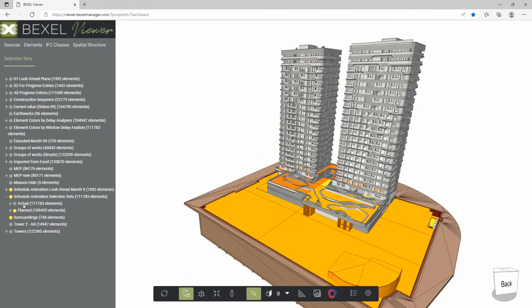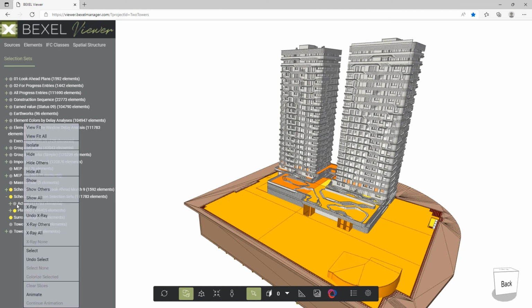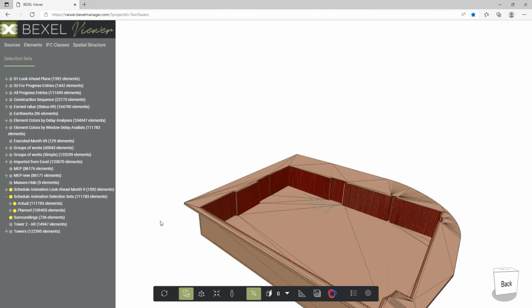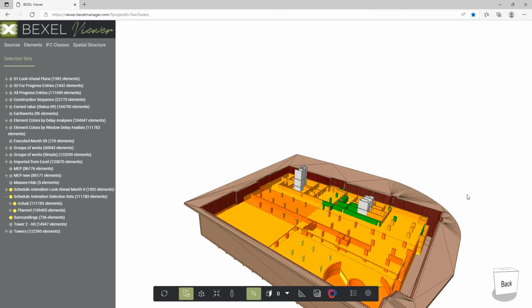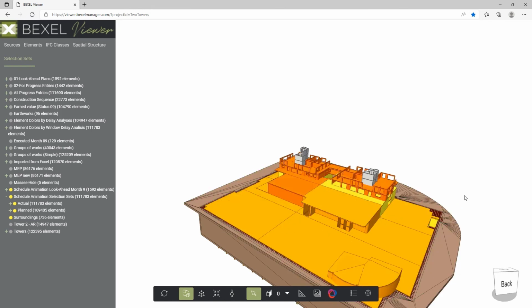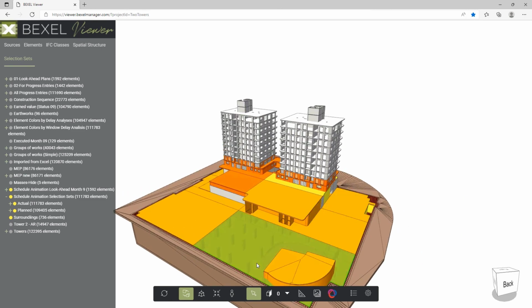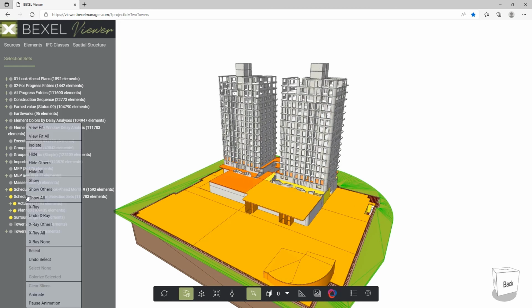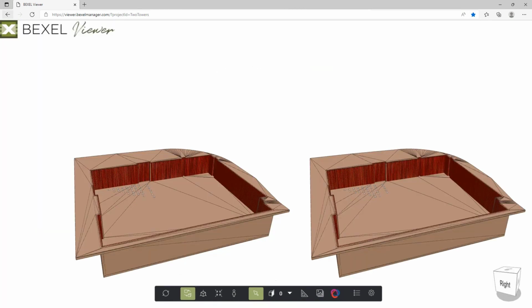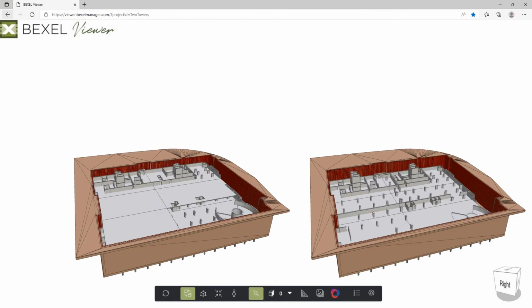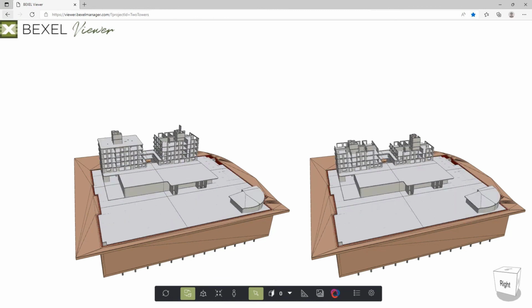Similar color coding can be done based on earned value analysis, where we made color variation based on earned value range, where elements and works colored in green and yellow have higher earned values, and elements colored in shades of orange have lower earned values. Elements shown in gray are related to tasks that didn't start at the moment of the latest progress entry.